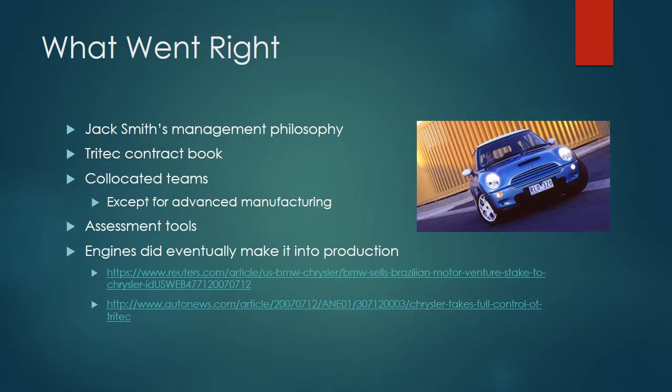The assessment tools used on this project were also noteworthy. They had several tools, one being the 12 panel chart, which summarized the key program objectives and tracked their status. They also had co-located teams, with the exception of unfortunately advanced manufacturing. Co-located teams definitely make for better collaboration. However, union laws restricted those advanced manufacturing staff members from being on Chrysler property. The engines did eventually make it into production, so in that facet you can say that went right.